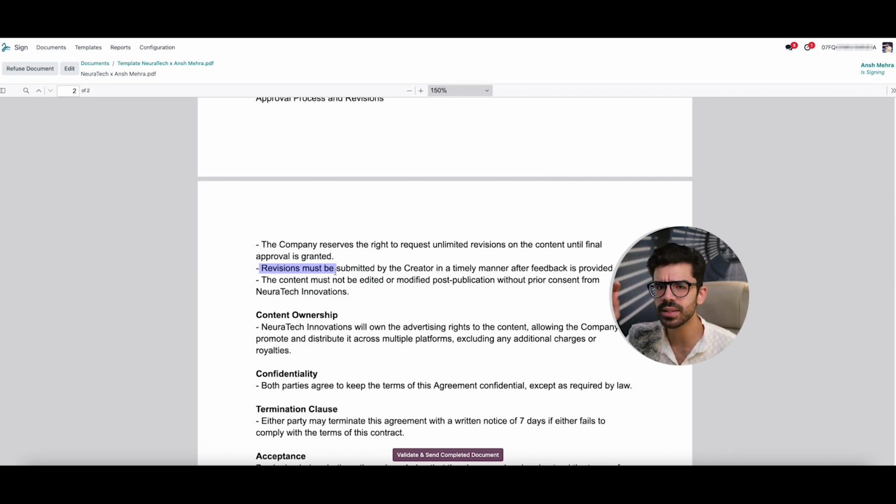In most cases, creators in general give 2 to 3 script revisions and 2 to 3 edit revisions, but not like completely revised reels. But yeah, you first send them a concept and then they approve that concept and then you say that we will not make changes to this. Beyond these 6 feedback cycles, you should have a clause for getting paid extra, and how much you get paid extra should also be submitted.